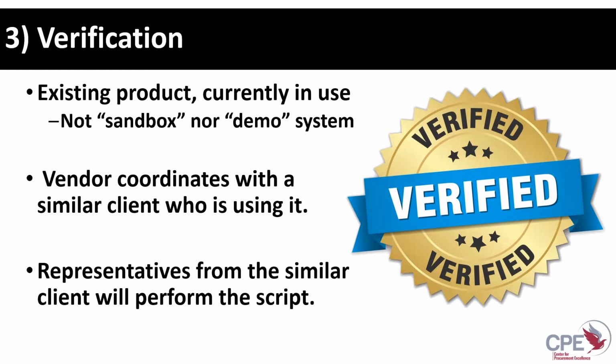And then ideally, what we found to be most successful is that the vendor themselves does not run this demo. You actually have a peer at that other organization who walks through your scripts. You still have a script here similar to that previous, number 2 type of demo. But you walk through that with a peer at another organization. They pull up their system. You say, hey, how do I create a new account? How do we process this? How do we perform that function? How do I add this? And they can show you real time in their system. So that's more of a verification.